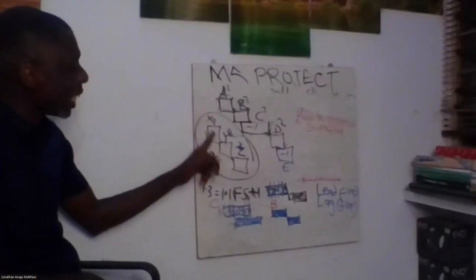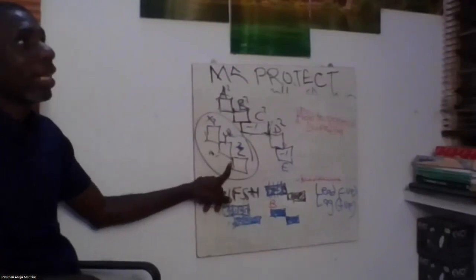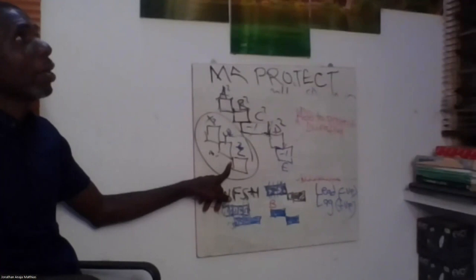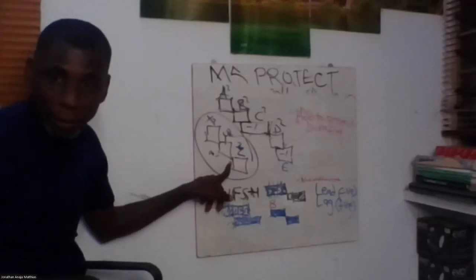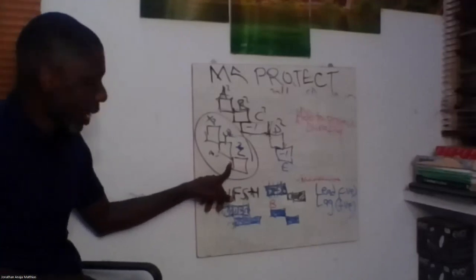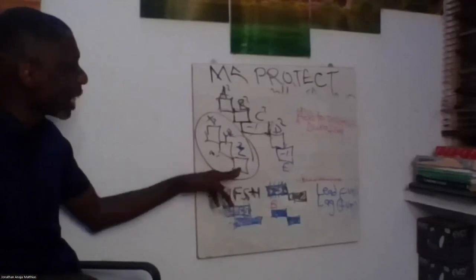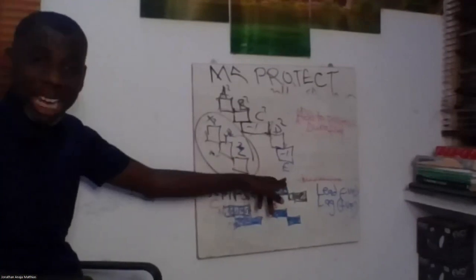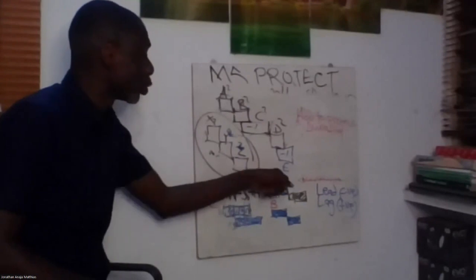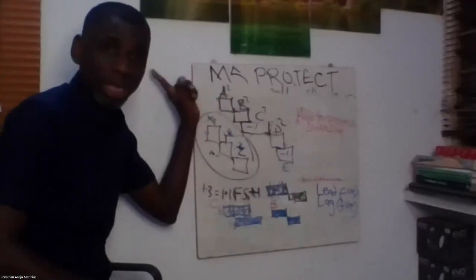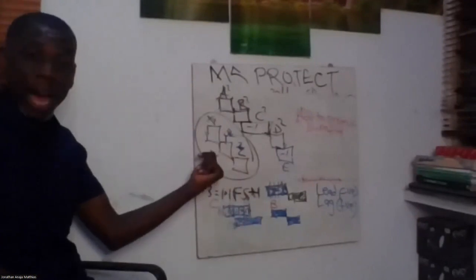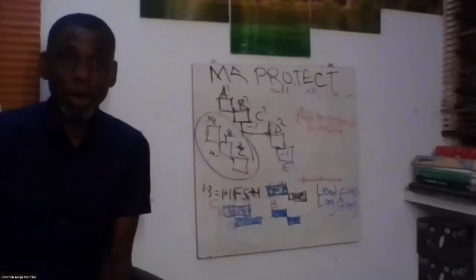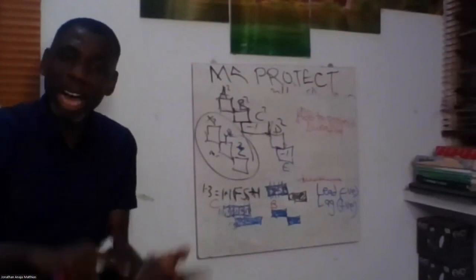Now I want to apply a lag here because probably I discovered that maybe the wall I thought would dry for me to paint in 2 days. Every rain now fell. Okay, I can hear somebody replying via the chat box, 2 days. Okay, yeah, that's correct. So the maximum lag I can put here now is 2 days, because if I do more than 2 days, it has done what? It will now exceed my critical path. So the non-critical path will now enter the danger zone and become critical for me.